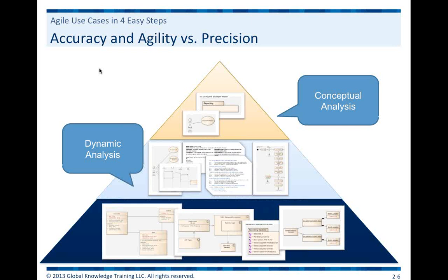So in an Agile environment, I would not create that one. I would not write out a use case specifications document in detail. I would create a sequence diagram for my designers if need be. I would create a process diagram and a use case diagram for my customers if need be to help them understand all the different processes that are going on within the solution. And that's about it. That's as deep as I would go. So we want to go to the first layer for our planning and the second layer for our analysis and elicitation during the sprint itself.